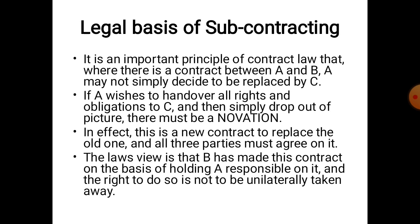The next topic is the legal basis of subcontracting. It is an important principle of contract law that where there is a contract between A and B, A may not simply decide to replace themselves with C. If A wishes to hand all rights and obligations to C and simply drop out of the picture, there must be novation. In effect, there is a new contract to replace the old one.